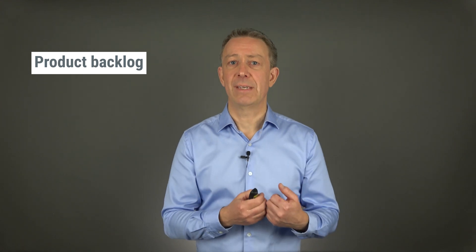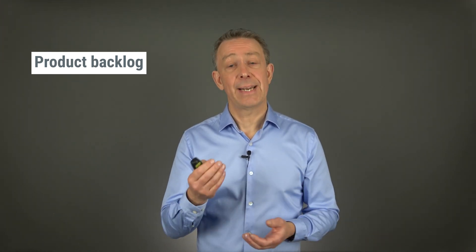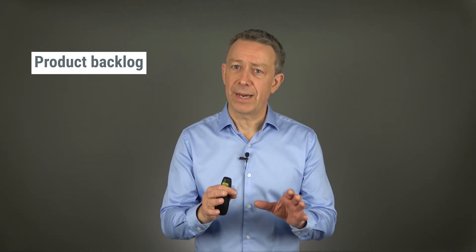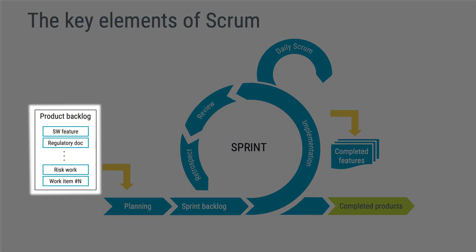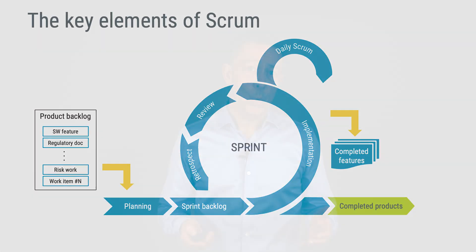The product backlog is the single source of input to the development team and is typically maintained by a product owner. It is prioritized, meaning that the top work items are most desired. Note that I'm intentionally saying work items and not requirements, because many other tasks could be overlooked if you only use the product backlog for requirements. For instance, the regulatory department might need help preparing specific technical documentation for a new region, or the software architecture might need to be worked on.